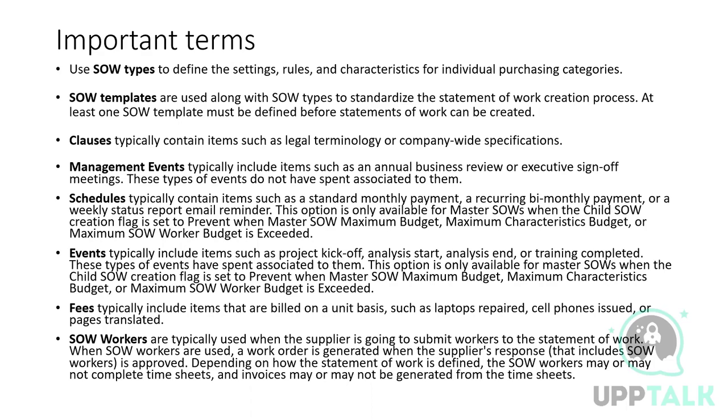And schedules. Schedules are like, if they decide to pay on a regular basis, say monthly or quarterly, irrespective of what's been delivered by that time, then schedules are maintained. And for each SOW, the maximum budget can be maintained.